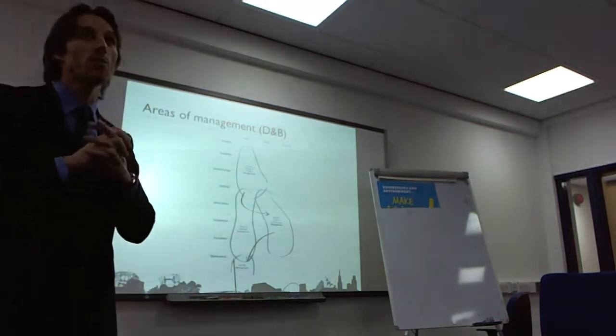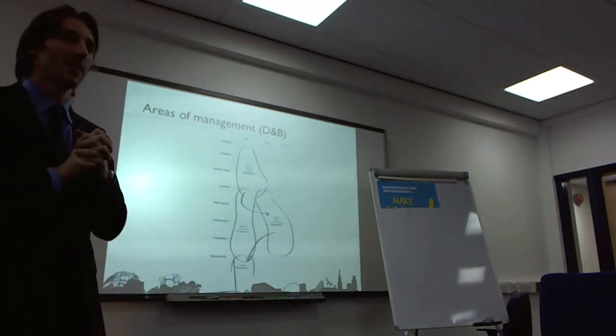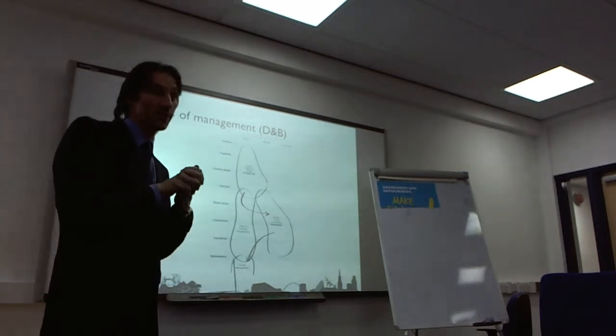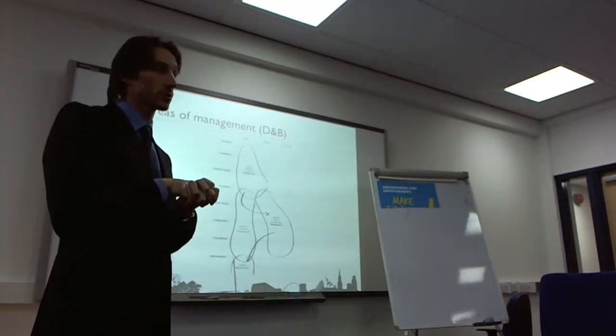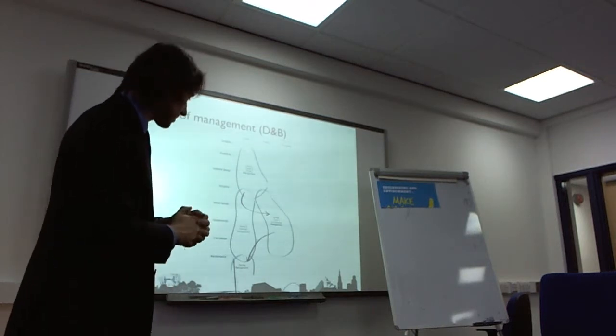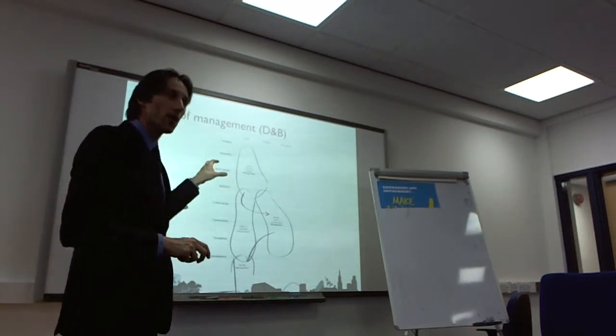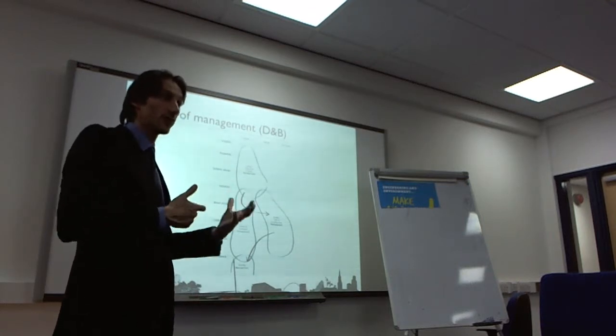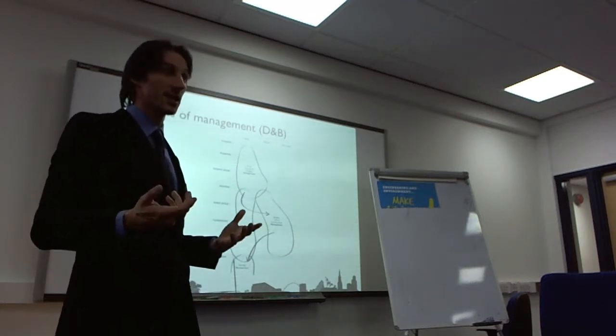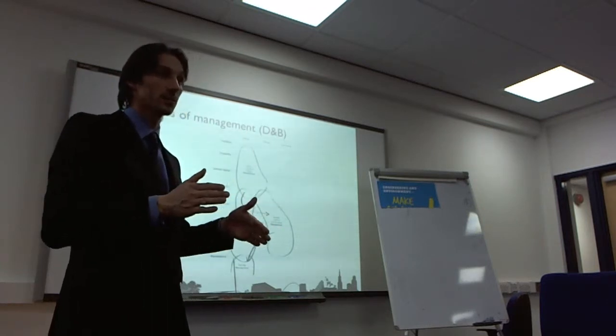Well, you say you mitigate risk. I would say you have a different risk balance between client and contractor. The pricing of the solution that the contractor offers can follow different schemes, but one of the schemes is a fixed amount.